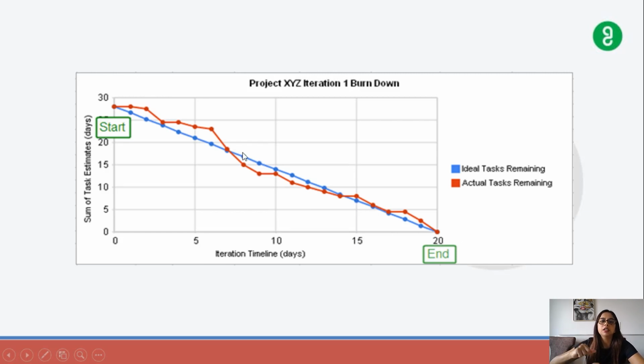So we have to achieve those points, as in we have to keep on completing our tasks. One task has some 4 story points, and a second task has some 2 story points. If we have to complete both tasks, there are 6 story points which we have to complete. We have to complete them in the 15 day sprint cycle or 20 day sprint cycle, whatever we are following. So accordingly, the total story points, the total number of stories which we have taken as a part of sprint number 1, is 30 in this example, which we have to finish off in 20 days.